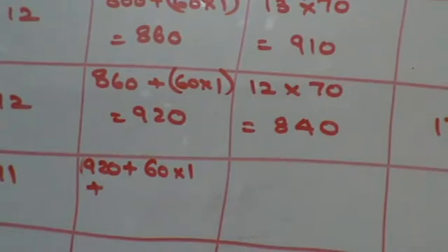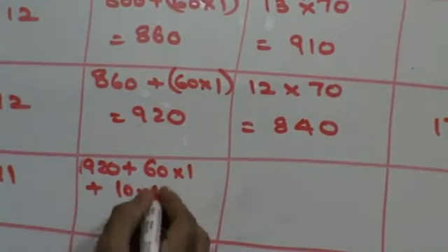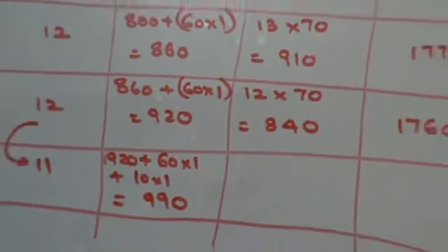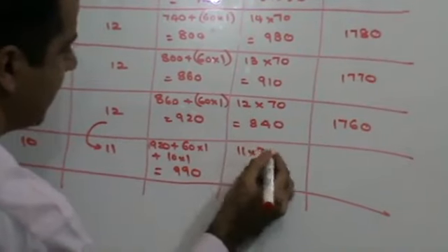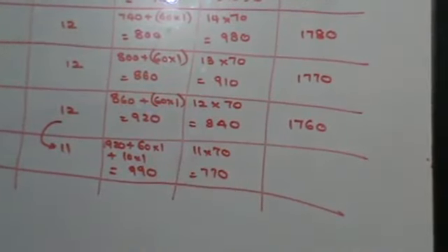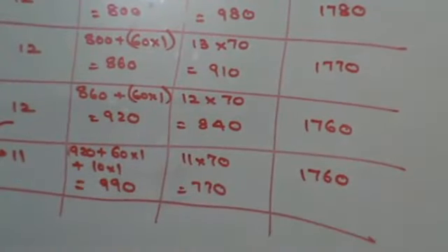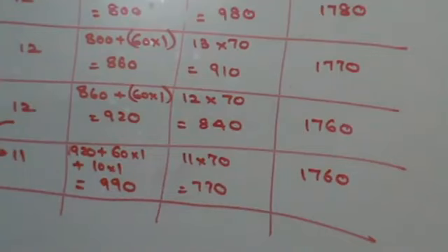Out of B, E and F, the smallest rank is of F. So you will have to crash that first. The cost of crashing F is 10 rupees, so 10 into 1. In that case, this will come to 990 rupees. Right? Do you understand this? Now, here this is 11 days, 70 rupees per day, 770 rupees. When you add this, it comes to 1760. My cost remains the same. I finished all the possible crashings. Fine, do we get this thing clear?